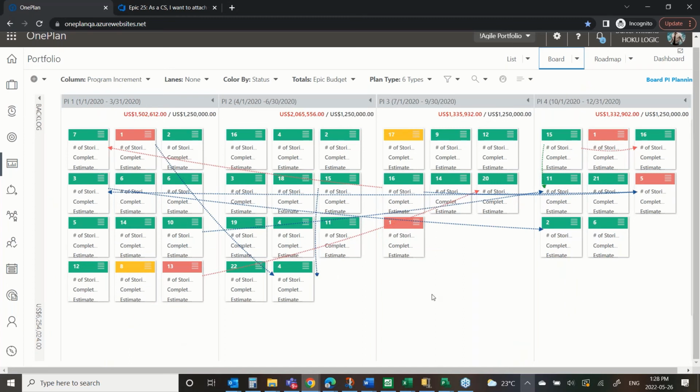Well, obviously, you can expand them out and read more of what's on them. But I'm looking at my different program increments. Now, in this particular example, the total value of each of these cards is exceeding the budget I set. I might need to set up a couple more program increments and move stuff around, or perhaps increase the budget. But you can see I've got dependencies showing up, whether they are a dependency or a blocker, in the case of the red lines.